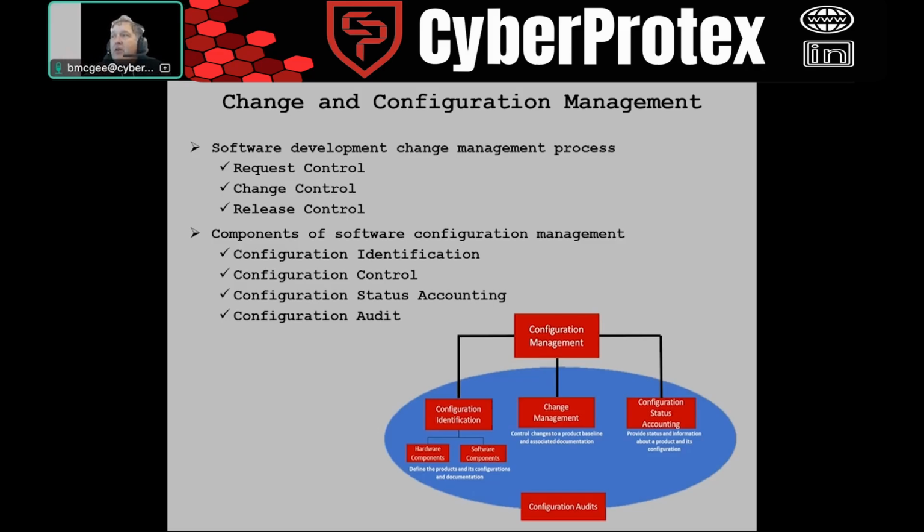And so if I thought something would take 100 hours, they would multiply it by pi to make sure that we had a little bit of wiggle room in there, but also, I guess, account for some scope creep as well. The customer changing their mind and wanting something else.